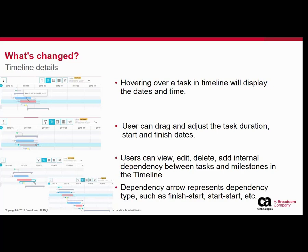The dependency type is determined by how you link the two tasks. For example, if you link the end of the first task to the start of the second task, it will create a finish-to-start dependency. Similarly, if you create a dependency from the start of one task to the start of another, it creates a start-to-start dependency.